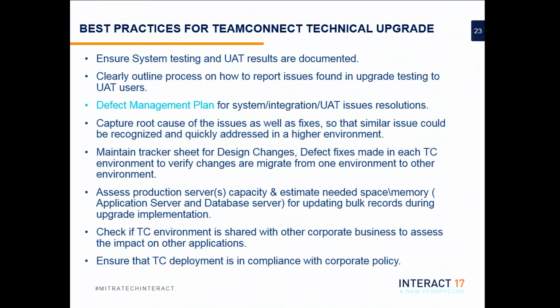Previously, there were different people who were owning the platform, with totally different rules. The corporation changed the rules, and as a result, whatever deployment file Mitratech creates for upgrading TeamConnect, the way it is is not acceptable to be deployed at Baxter. So Baxter wants a deployment that, first of all, could be deployed with an automated tool and not manually.